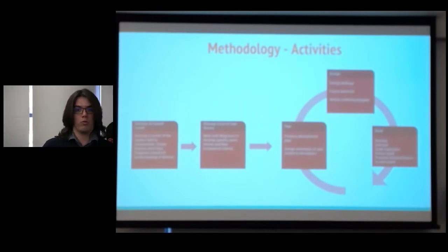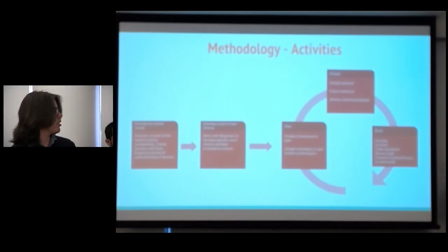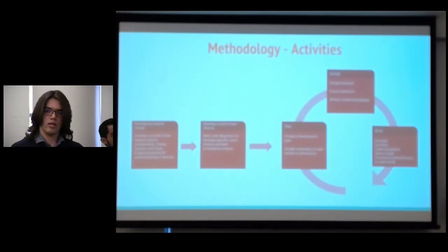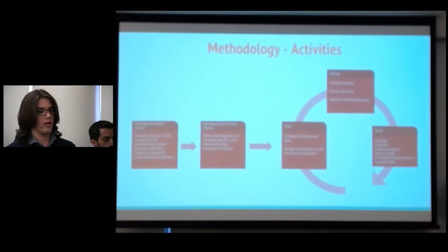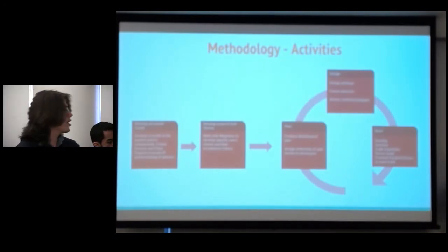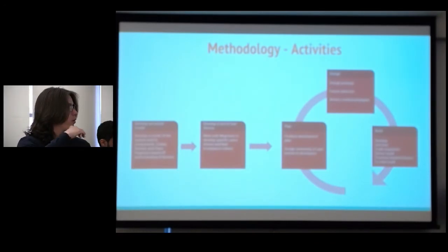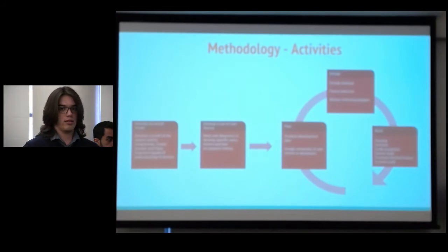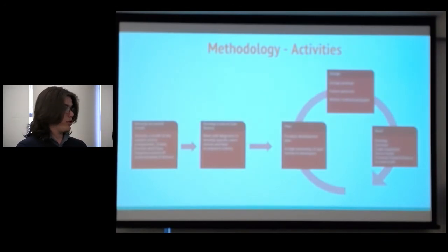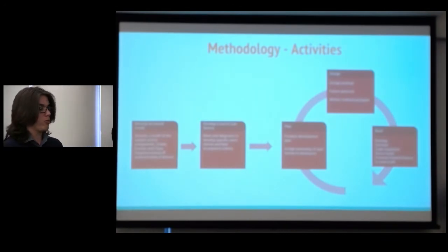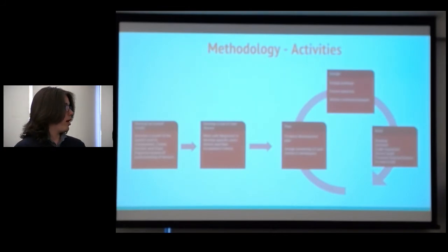From there, we go into the second step. Over a couple of weeks, we worked with the Wegmans team to elicit requirements, and we created user stories together that we think will fit this project. From those user stories, we keep refining the initial model, which is our main guide through the project. From then on, it's the iteration parts, and this is where we currently stand. Each iteration starts with planning. Both teams get together and decide which user stories we want to implement for this iteration. We agree on them, and we divide the work as a group. Next up is the design phase.